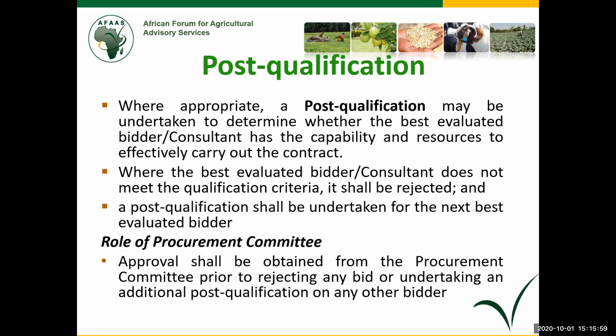So once you go for post-qualification, approval shall be obtained from the Procurement Awards Committee prior to rejecting any bid. So if the best evaluated failed, you have again to report back to the Procurement Awards Committee, and the approvals are changed to the next best evaluated.